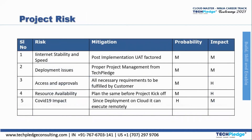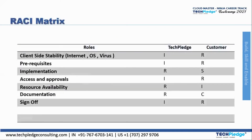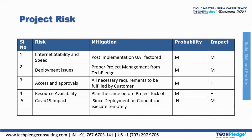Every project comes with risk — it's not that everything is always fine. There are different risks that come into the picture, but risk can be mitigated; it cannot be totally stopped, but you can provide a background solution to mitigate it. Regarding internet stability and speed: post-implementation UAT is factored in as the mitigation strategy, and the probability and impact for this risk is medium.